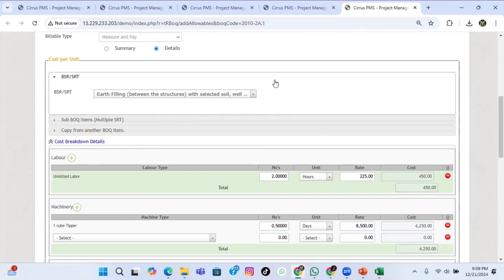For example, here we capture details from purchase orders, subcontractor details, rates, everything. At the tender stage, we will be using them, but sometimes, due to some reasons, cost can be higher than the planned cost. In that case, it will be highlighted in red and you can take corrective action.